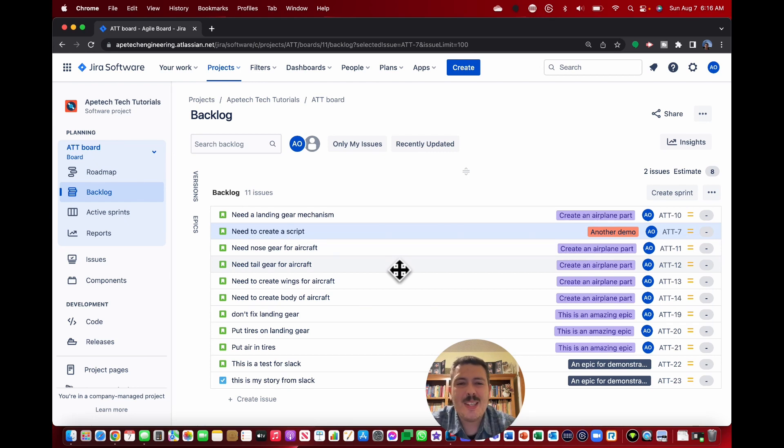That covered the where and the how — a two-for-one. One thing to keep in mind: this is an ongoing activity. You should be doing this sprint to sprint — not every single day, but at least two to three days before the start of each sprint so you have the newest items. This is a very strategic collaboration with your product owners and other key stakeholders who have influence over the direction of your organization. You don't want to wait until sprint planning to strategize — figure that out beforehand and deal with the nuances of strategy before presenting the plan to developers.